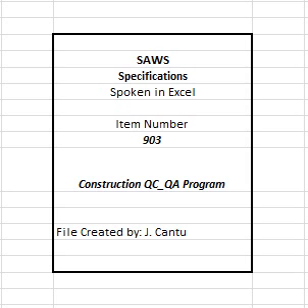B. Shop drawing logs. C. Submittal logs. D. Request for information logs. E. Traffic control plans. F. Coordinate use of owner's premises, including, but not limited to, layout of temporary facilities, temporary utilities and controls, security, field office and storage facilities, operation of owner's valves, facilities, tie-ins, bypass pumping, flow diversion or interruption of owner's facilities, etc.